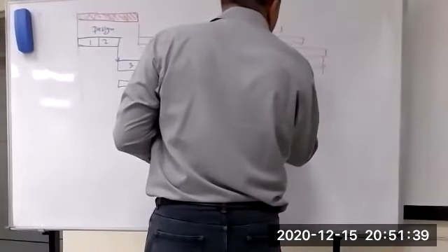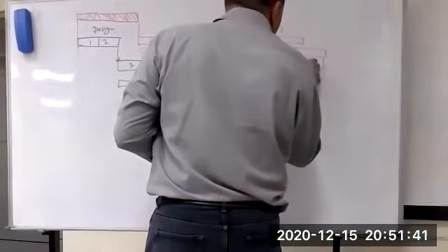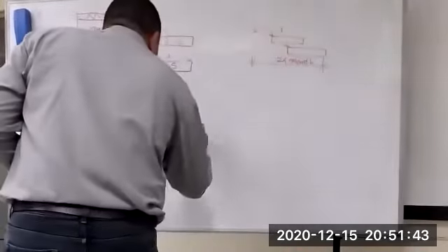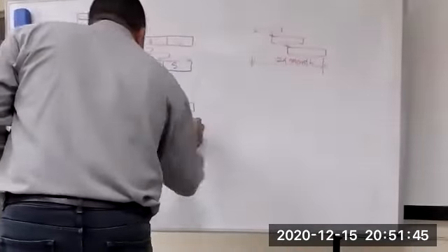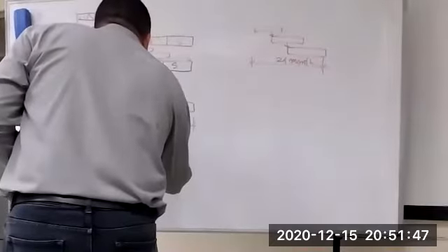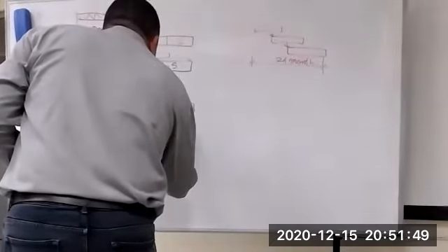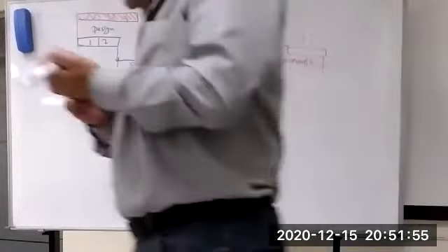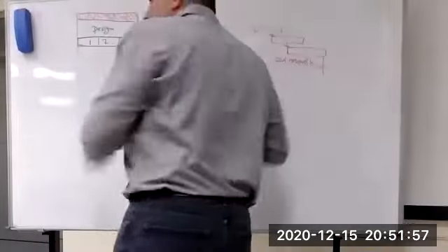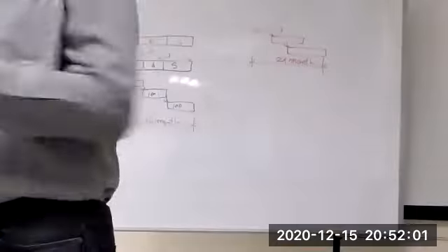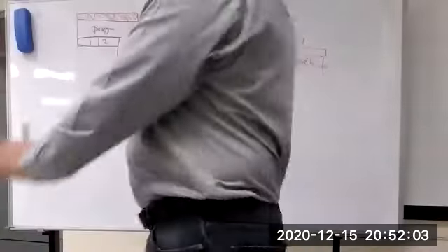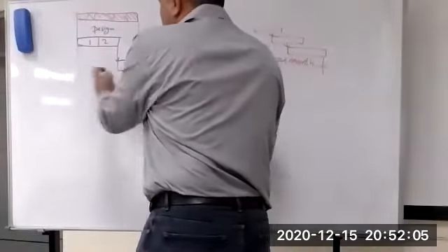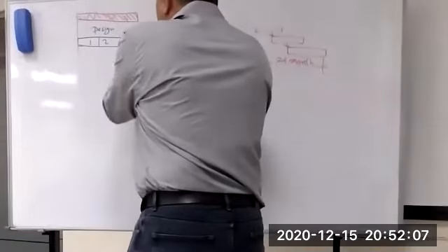What are the consequences? This is what we call fast tracking. It is the latest technique to shorten and compress the execution. Yes, I compress execution from 3 years to 2 years.